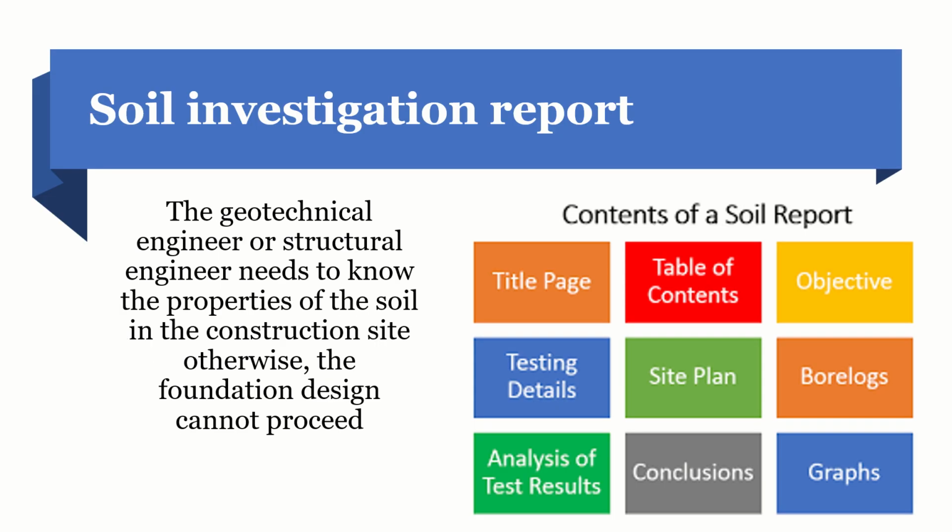And the next one is the soil investigation report. Basically, the soil investigation report should be prepared before the design of the structure. The geotechnical engineer needs to know the properties of the soil in the construction site, otherwise the foundation design cannot proceed. The soil investigation report basically contains soil properties, types of soil, the load bearing capacity of the soil, etc.